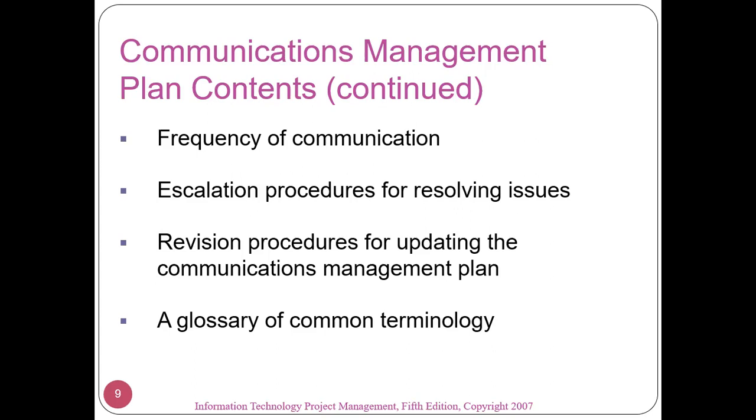It is important to know what kinds of information will be distributed to which stakeholder. So by analyzing stakeholder communication, you can avoid wasting time or money on creating or disseminating unnecessary information. The project's organizational chart is a starting point for identifying internal stakeholders, and you must also include key stakeholders outside of the project organization, such as the customer, top management, and the subcontractors.